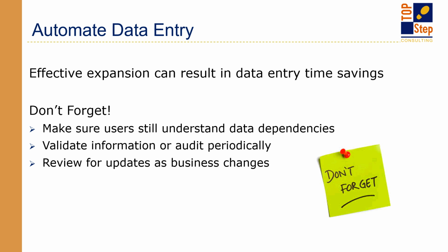So you might be saying, well, what might you automate? Well, you might automate billing, but you have a data dependency on your bill rates. If your bill rates aren't correct, then your billings are not going to be correct. Because Susie put in 10 hours, your billing was $150 whenever it should have been $200. You are losing out on money. So you have to go back, and sometimes undoing the automation is not as easy as making the automation run.